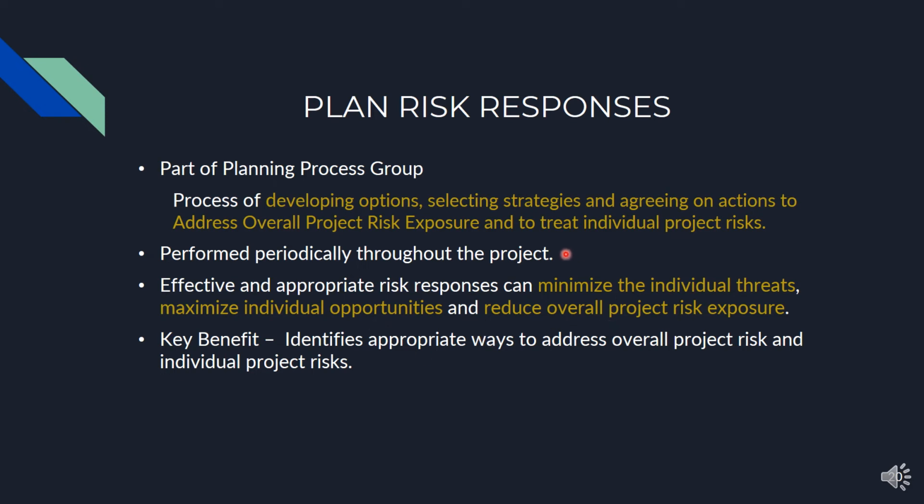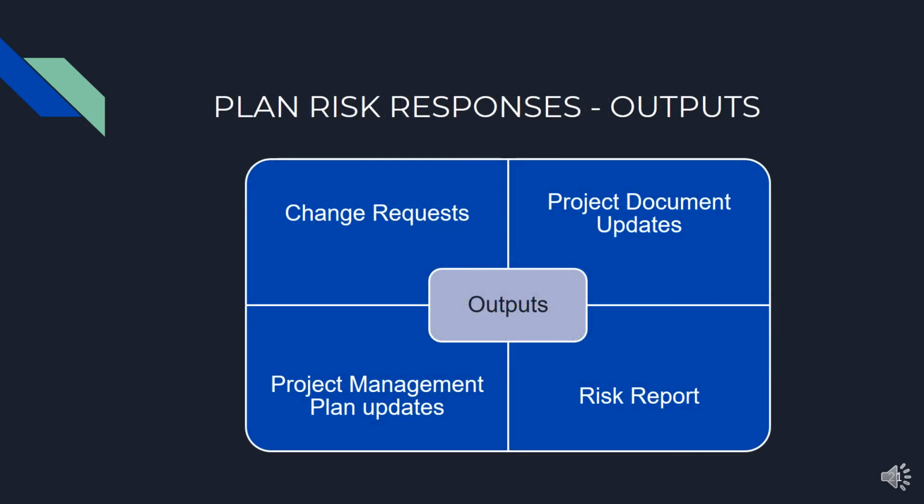It is performed periodically throughout the project. Key benefits are it identifies the appropriate ways to address overall project risk and individual project risk. The outputs of plan risk responses are change request, project document updates, project management plan updates, and risk report.